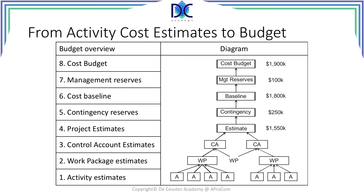Your project estimate was one million five hundred and fifty thousand dollars. The contingency budget is two hundred and fifty thousand dollars, so now you have a total baseline budget of one million eight hundred thousand dollars. Management adds some reserves of one hundred thousand dollars, which gives a total budget for your project of one million nine hundred thousand dollars. That's the overview from activity to the total budget for your project.